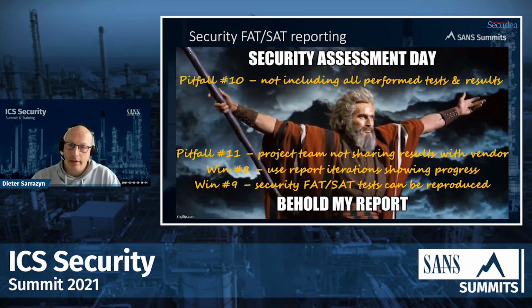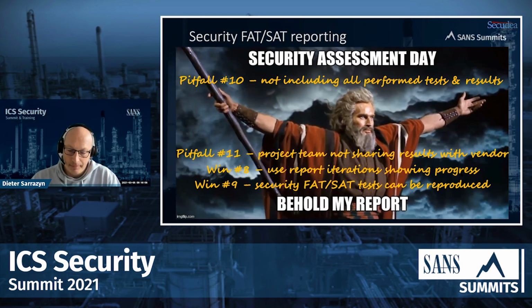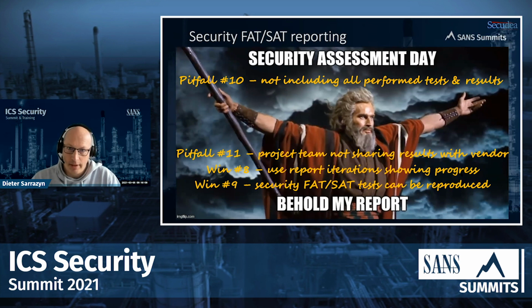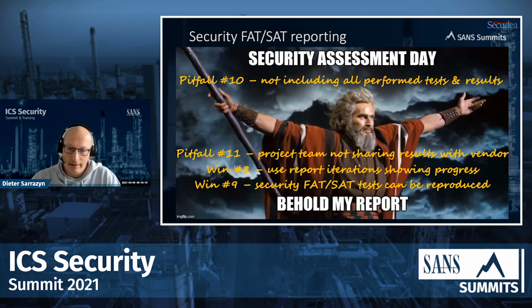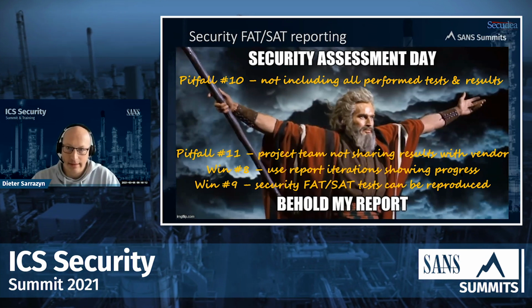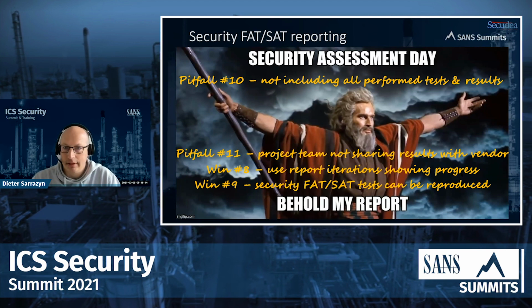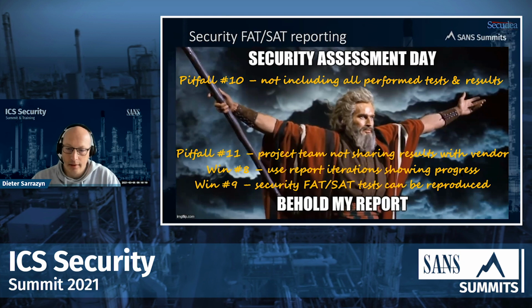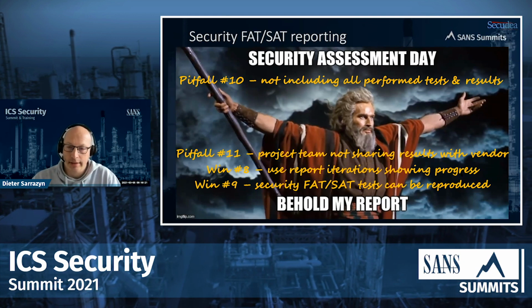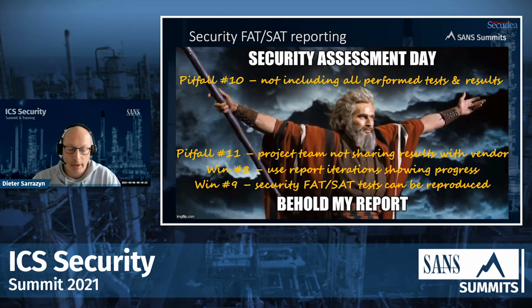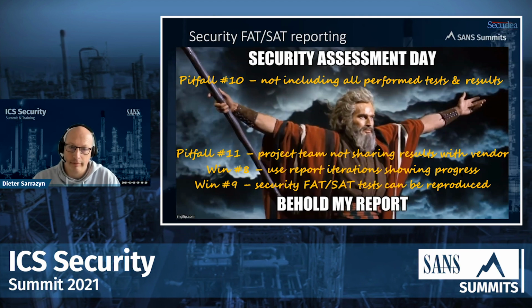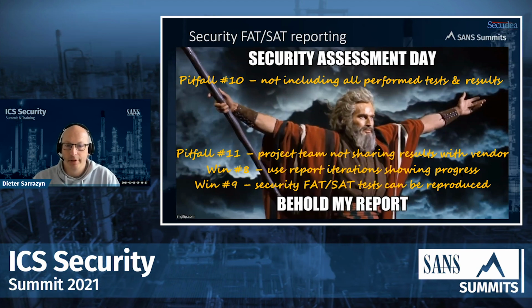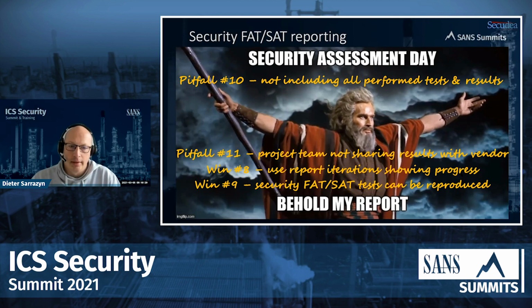So the pitfalls here and the wins here. The pitfall is not including all performance tests and results. What I mean with this is that you have to write every single thing down that you have tested, every single result. This is really important if you are dealing with some regulating organization. That's more the case within heavily regulated sectors, but that's really important.